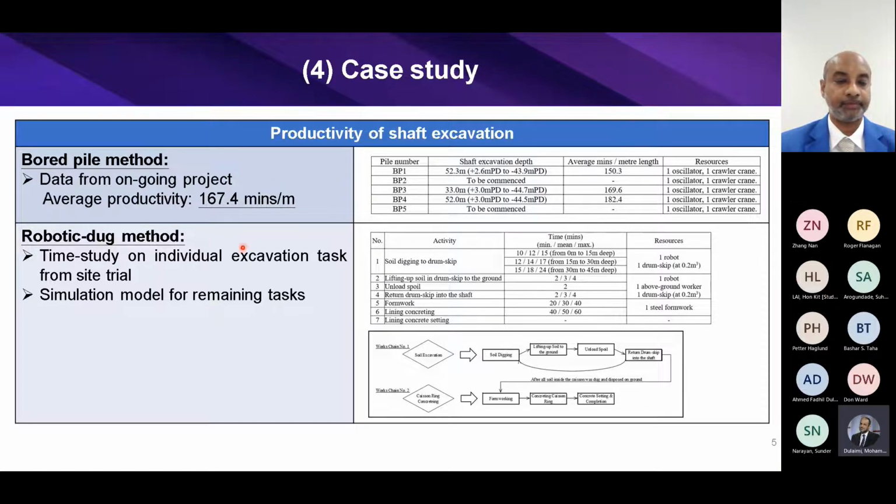On the other hand, we try to obtain the productivity of the robotic dug method in this way. Firstly, we carry out time measurement on individual excavation tasks from site trials. Together with that, we developed a simulation model for the other remaining tasks of caisson construction so as to obtain the overall productivity.